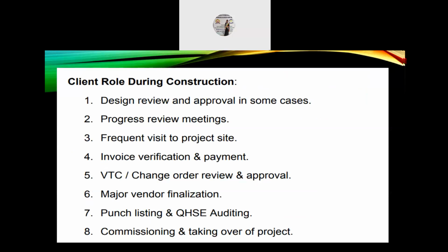Client role during construction. So 1. Design review and approval in some cases. 2. Progress review meetings. 3. Frequent visit to project site. 4. Invoice verification and payment. 5. VTC or change order review and approval. 6. Major vendor finalization. 7. Punch listing and QHSE auditing. And number 8. Commissioning and taking over of project.